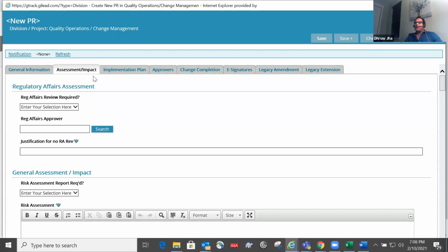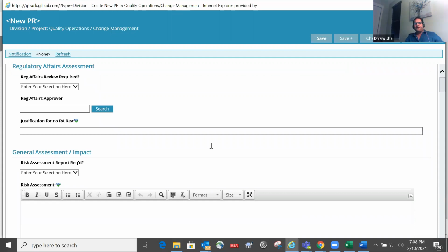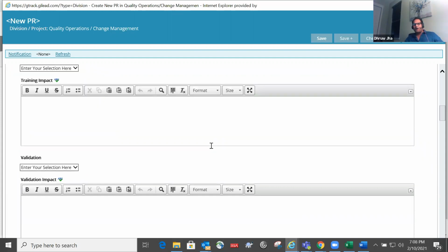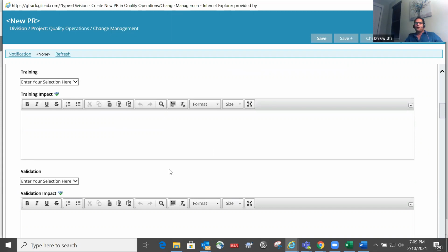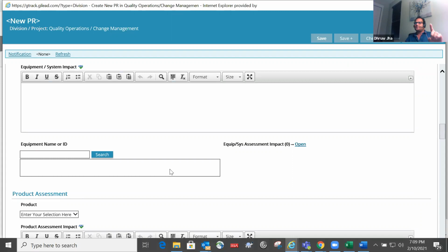Now look at impact assessment. Everything, even these signs, are all part of FRS. Everything has to be tested and validated. Each and everything. Only this change control, change management module, to validate it will take you more than 1 year for 20 engineers.